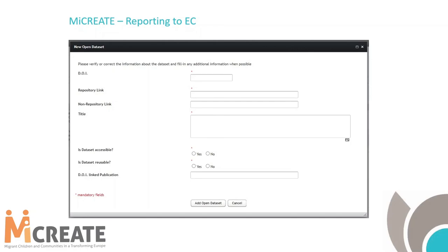So this is very, very important, because something I didn't tell you before is that data archives take an extremely long time to go through your data. It can take months. So if you finish your research 2 months before the end of the project, and you then start thinking about giving everything to the data archive, start negotiating with the data archive, and they say, okay, yes, put the data in, it will take you, I don't know, how many months. We ended up at the beginning of the summer, you know how summer is, it's a time for vacation, we don't have the staff, we cannot work on this now.